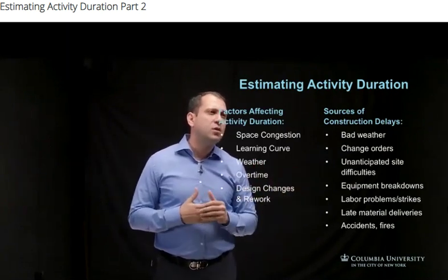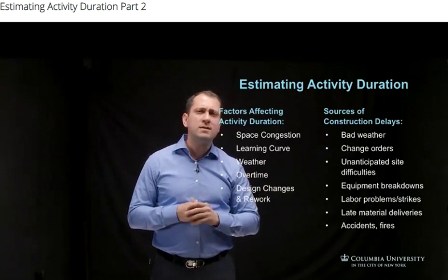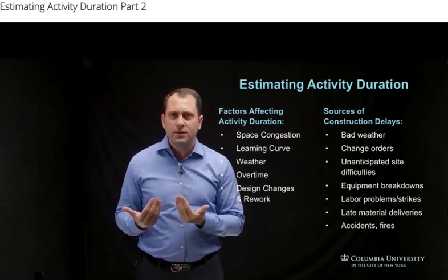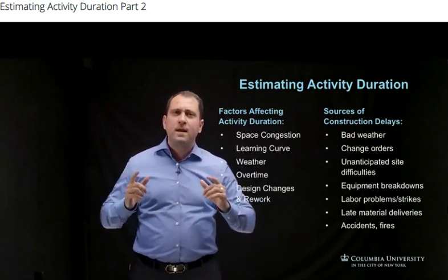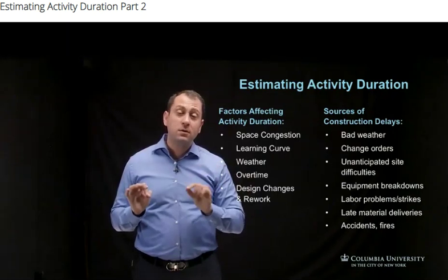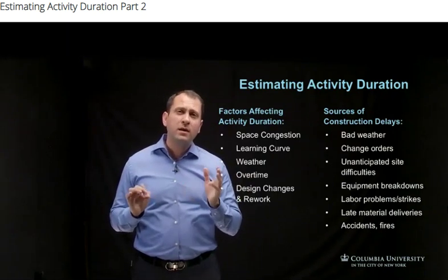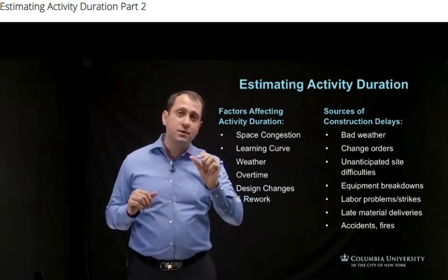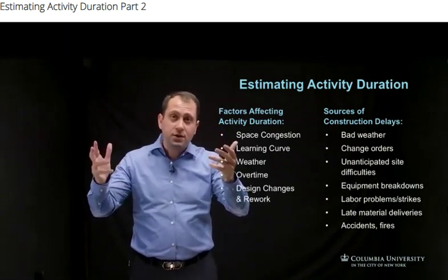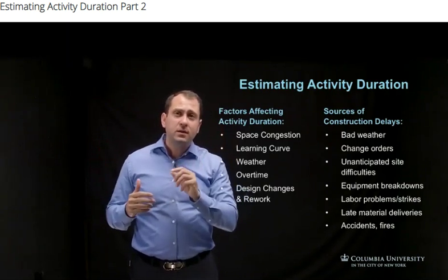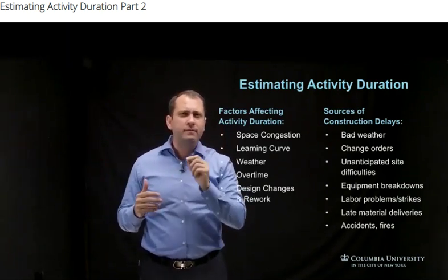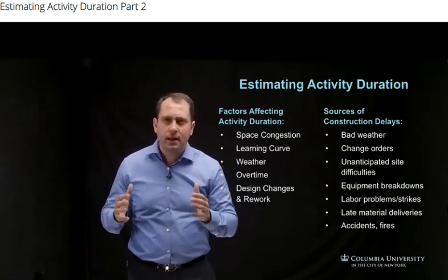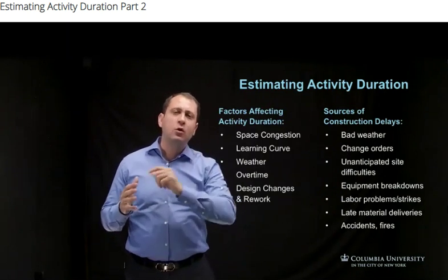Unanticipated site difficulties, which I would love to explain more. Usually we call it the unforeseen site condition. It means a physical condition encountered while you are performing the construction activity, however that specific condition was not visible and could not have been discovered by a reasonable site investigation at the time of bidding on your project.